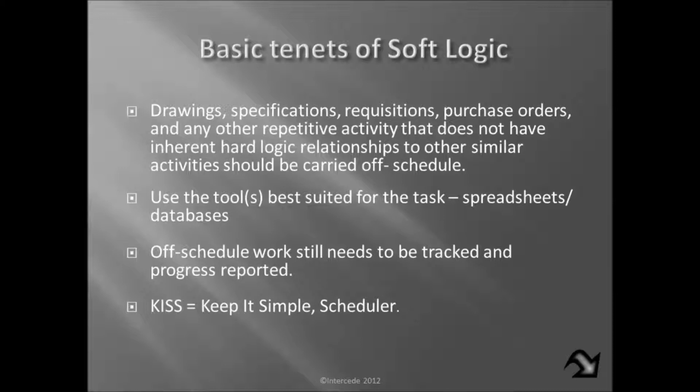But in procurement, I find a database to be particularly effective, especially if you're able to have access to something like a SharePoint site where you can have access to your engineers' material requisition forms, your expediters' status sheets, your purchasing status reports.